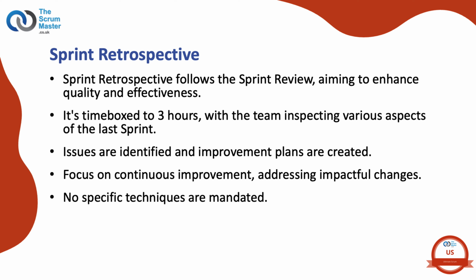Scrum does not describe the techniques used to conduct a sprint retrospective. There are many ways to do it, and books have been written on the subject. A typical good practice that many Scrum teams implement initially is: 1. Identify issues. The whole Scrum team reveals and understands the current situation. The output of these discussions may then be ordered so that attention can be focused on the most important, impactful or urgent issues. 2. Explore options.